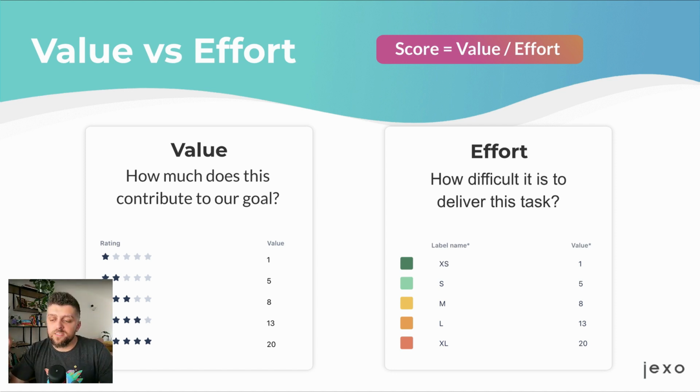In this case, you see on the top right of the screen the score formula, where we divide value by effort.